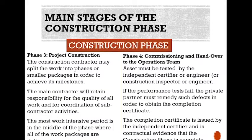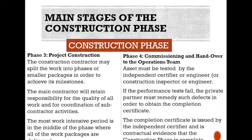Phase three: project construction. The construction contractor may split the work into phases or smaller packages in order to achieve its milestones. The main contractor will retain responsibility for the quality of all work and for coordination of subcontractor activities. The most work-intensive period is in the middle of the phase where all work packages are delivered. Phase four: commissioning and handing over to the operations team. Assets must be tested by the independent certifier or engineer. If performance tests fail, the private partner must remedy such defects in order to obtain the completion certificate, which is issued by the independent certifier and is contractual evidence that the construction phase is complete.